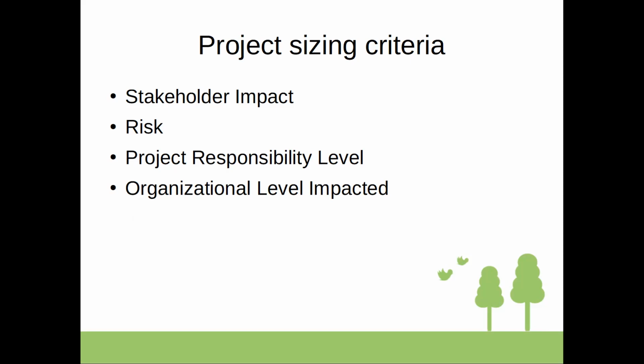If not, you might have to double this resource, like let's say a person allocated to the project for the execution for the certain period of time, and then taken away for another project. You have to take into account, and this increases project size because you need to, let's say, double book the person. Those are the risks that I mean.